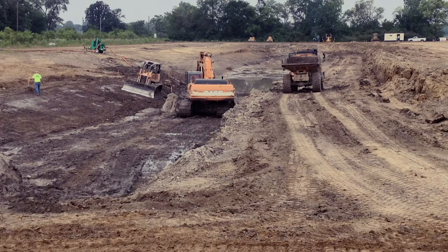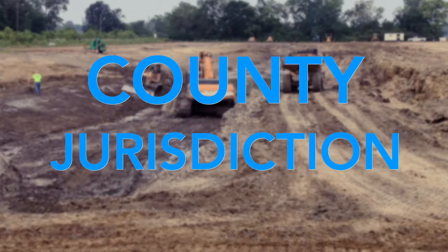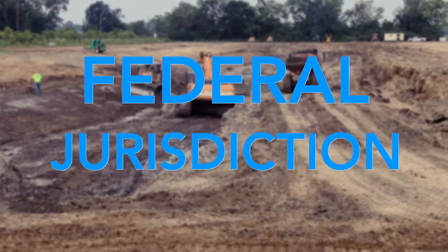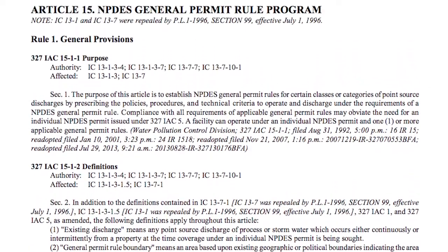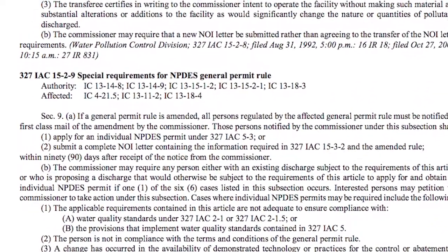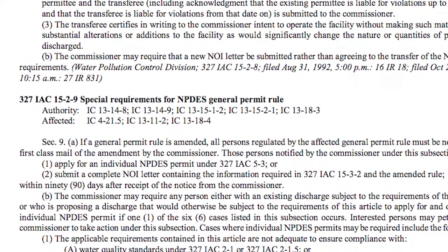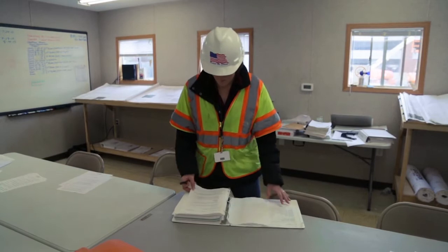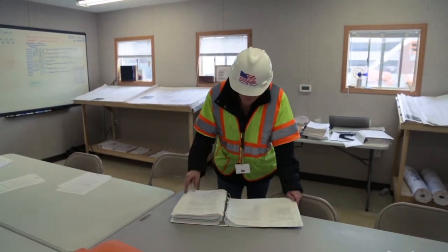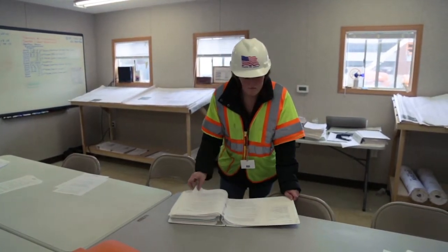Find out who is the stormwater quality permitting authority for the site. Is it under city, county, university, state, federal, or other jurisdiction? Know the ordinance, NPDES or IAC. Keep an electronic copy with you for reference. Obtain copies of any permit documents that will indicate what type of project it is, how large the project site is, and who the responsible parties are.